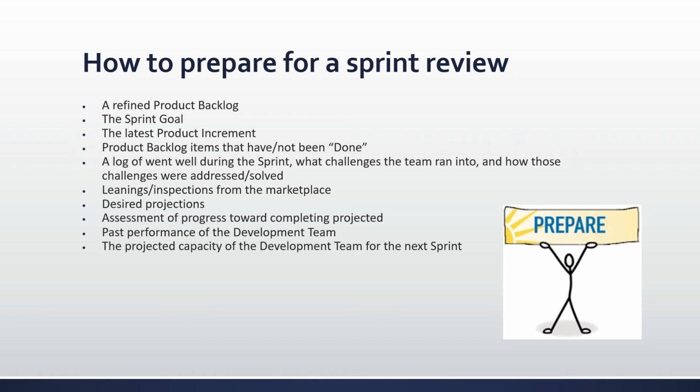You should have the learnings and inspections from the marketplace. You should have desired projections. You should have assessment of progress towards completing projected work by the product owner. You should have past performance of the development team and the projected capacity of the development team for the next sprint.